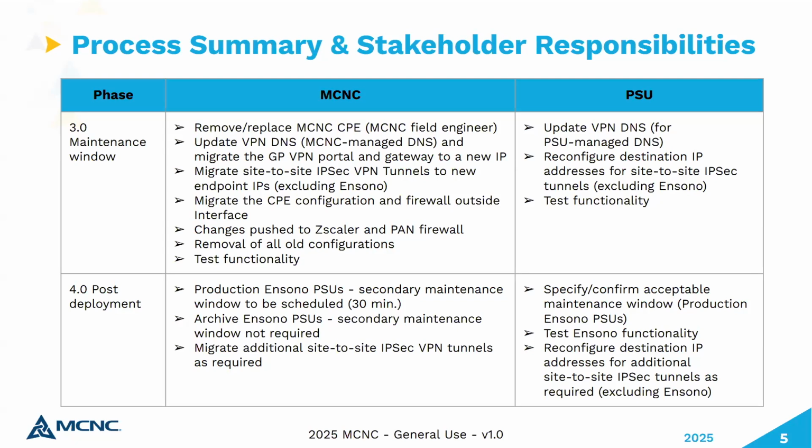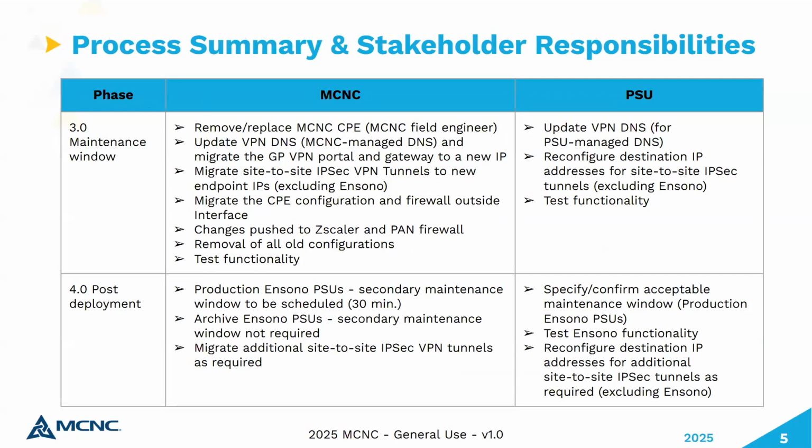Another thing we'd like to do is migrate the site-to-site VPN tunnels, the IPsec tunnels, if you have any. This excludes the Insono ones, which Dave has talked about. We do realize that if someone has a lot of tunnels and there's no way to get, maybe, a third-party person who controls the other end of the tunnel on the maintenance window, we do have a contingency plan to not have to migrate those. But of course, we would like to migrate them as quickly as possible.